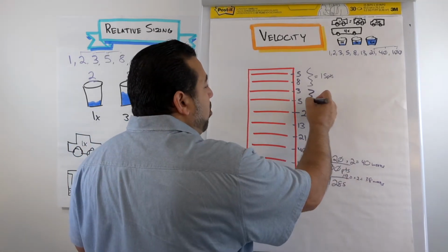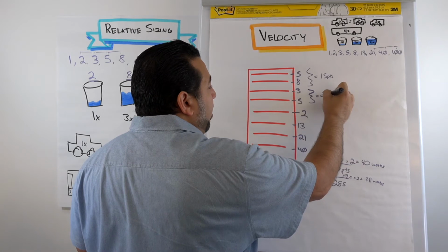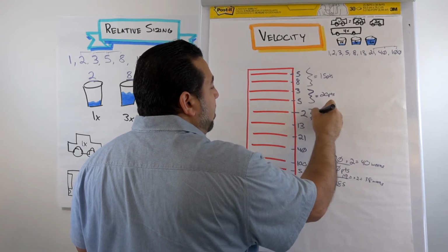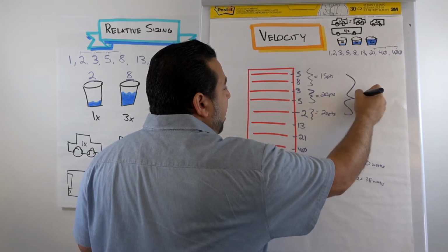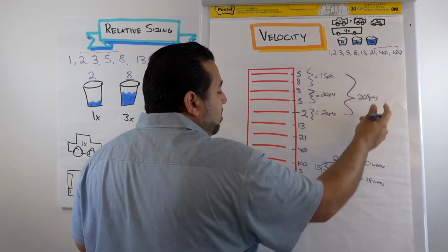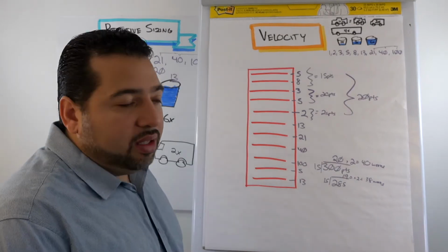The team does some more work here. Maybe this time they do 20 points. They do a little bit more work here, and then now they do 25 points. I'm going to use the rolling average of the last 3 sprints of 20 points to predict how much longer it's going to take to get done.